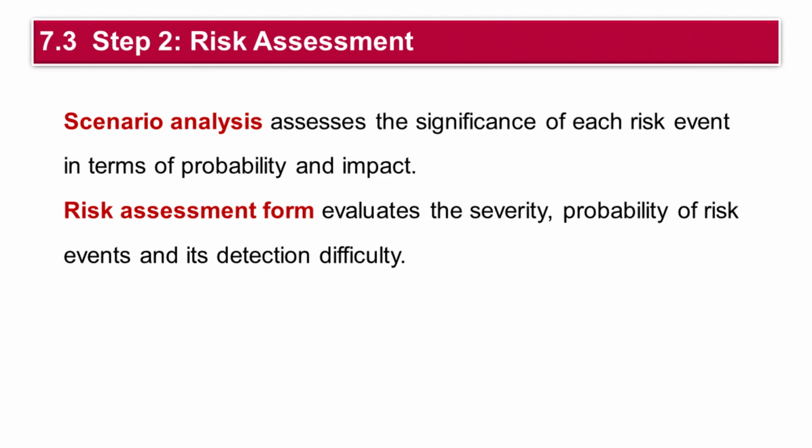To ensure a credible risk analysis, the project team needs to define different levels of probability and impact. These definitions should be tailored to the specific project. For instance, a simple scale of unlikely to highly likely might suffice for a smaller project, while a larger project might benefit from a more precise numerical scale. For example, 10% equals unlikely, 50% equals likely.